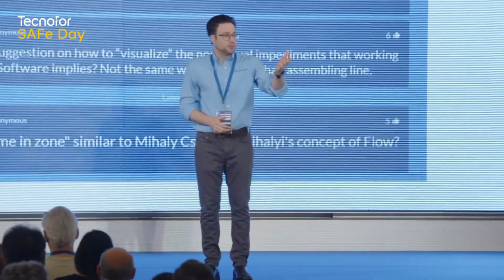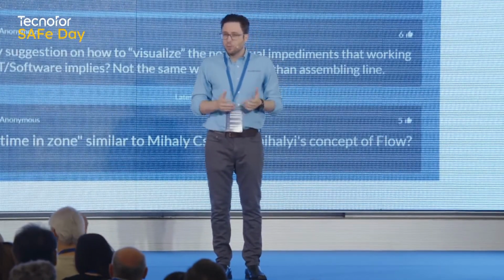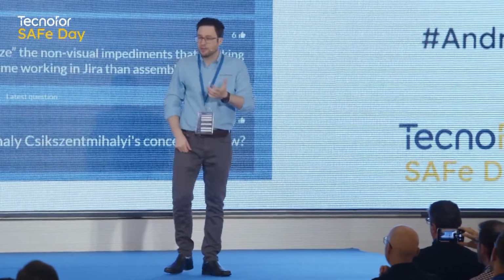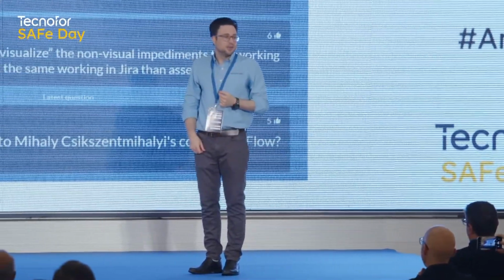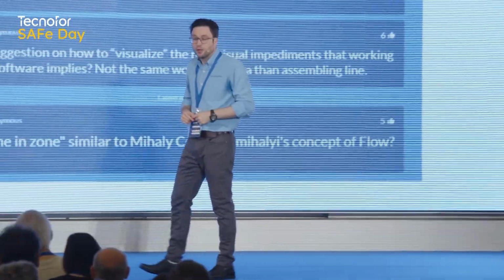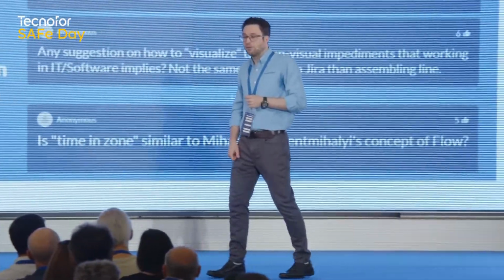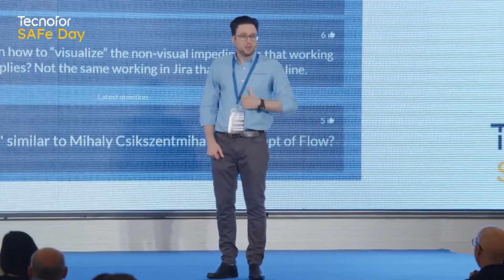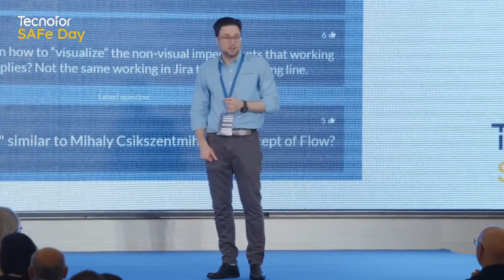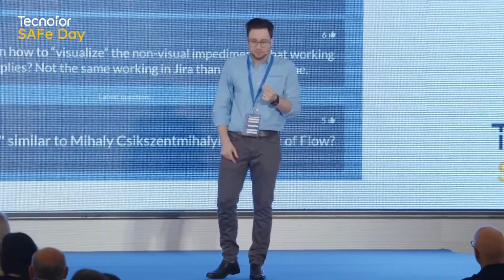So it's one thing just to look at the numbers, and maybe I say two things here. In the flow metrics article, you'll see a couple of things mentioned. One is that we need to use the flow metrics in combination. So maybe we see something like the flow time improving, but actually when we look in detail, we see that our predictability is all over the place. We're delivering features really, really fast, but we're not able to deliver the business value associated with our objectives. Well, that's not good. And the second thing we always say with the flow metrics is don't just look at the number. We're not just chasing flow velocity. We want to speak to the teams. We want to understand their satisfaction, their happiness. We want to understand the problems they're facing. So we always make sure that we do the Gemba and we go and understand the numbers that we're seeing.